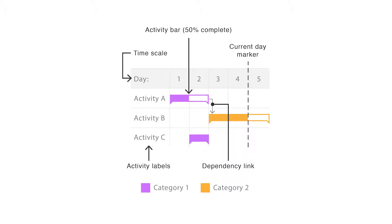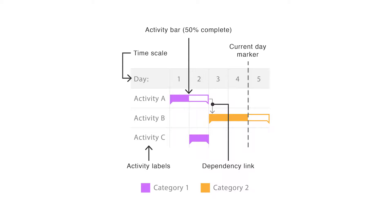Color coding the bars can be used to categorize the activity into groups. To show the percentage of completion of an activity, a bar can be partially filled in, shaded differently, or use a different color to differentiate between what is done and what is left to do.